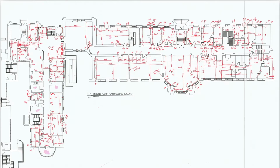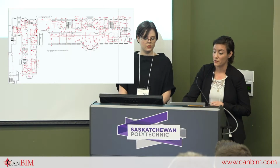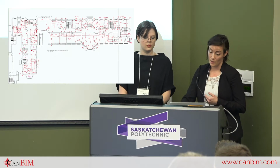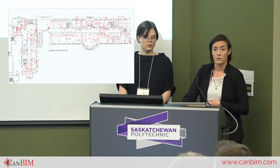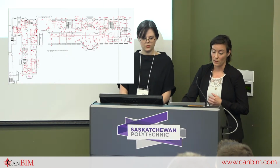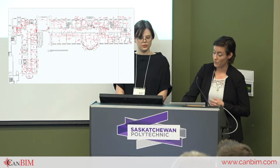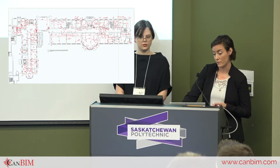Most of the interior as-builts were done by on-site measuring. This was more efficient than point cloud scans of the interior. First reason being that measurement of the spaces was easy to do as these were all smaller spaces. Secondly, the point scanner would have had to have been set up in each room within the campus, and there are hundreds of rooms. With the time constraints, this was just not feasible. Therefore, key heritage spaces were point clouded to provide us with a high fidelity source to reference.